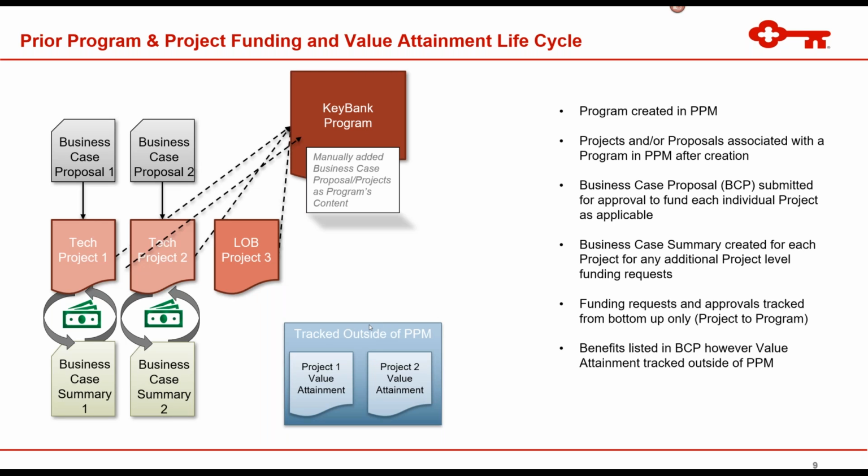And then additionally, outside of that, we had value attainment that was being tracked. It was actually being tracked in SharePoint. So these benefits that these projects were promising when they requested initial funding or additional funding, the realization of that promised value was being tracked outside of the PPM tool. And there really wasn't a good mechanism to kind of tie those without having manual or duplicate data entry.